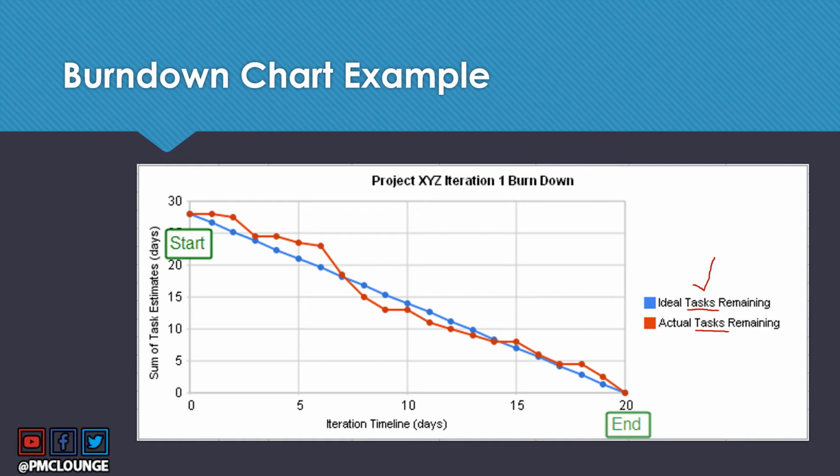So this is the total number of tasks required to be accomplished for this time boxed iteration. Remember, this is not for the entire project. This is only for an iteration. It could be a 2 week sprint, it could be a 20-day iteration as well. So these are the total number of tasks that your project team needs to accomplish in this iteration.